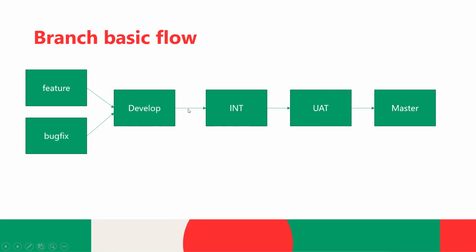For some project, let's say there is a parallel development going on, right? Let's say after sprint 5, there will be sprint 6, 7, 8, 9, 10. Every 5 sprints, there is a production deployment. It means one release equals 5 sprints. So after 5 sprints, we need to cut down, we need to create one release branch. Okay, and that branch will be responsible for production deployment without stopping our sprint 6 development.